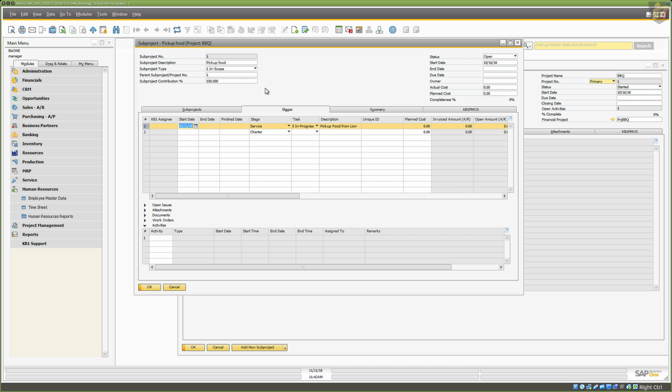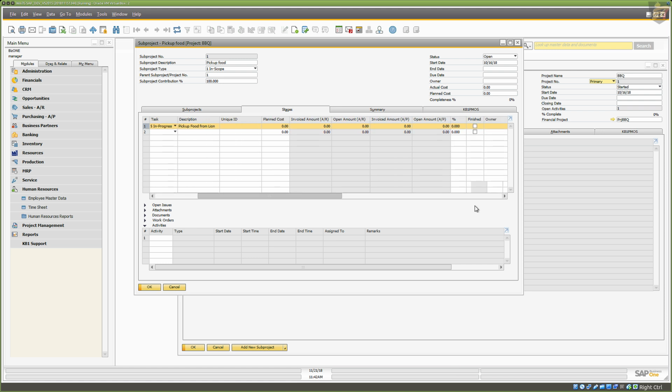There's just no reason for that. So instead of giving them the budget, give them the billable effort that you believe it takes. What's nice about this as well is that they can submit their time as they're doing the work, and you can watch that deplete.